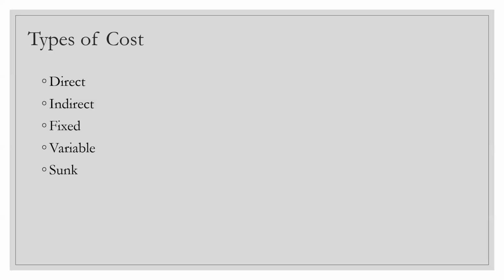Now, variable cost is something where your employees who are going to join your project, maybe they are on contract. Okay, so maybe they are on the yellow badges or green badges. So what happens here is that maybe you have taken them on a contract of 6 months to 1 year, and at the end of the 6 months or 1 year, when you go to renew the contract because you need them more, at that point of time the pricing might not be the same.